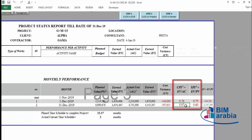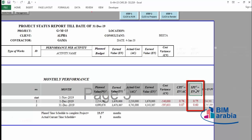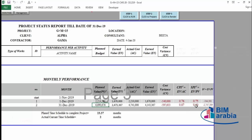The CPI is 0.87 because the CPI equals earned value divided by actual cost — since we are over budget, it comes to 0.87. The SPI, or Schedule Performance Index, indicates performance in progress over time. You should have completed work worth 6 million 890 thousand but actually completed work worth 4 million 143 thousand, giving an SPI of 0.60 — below one, since SPI equals earned value divided by planned value. A value above one means you are ahead. Here is also the schedule variance — the amount of work not completed according to plan.